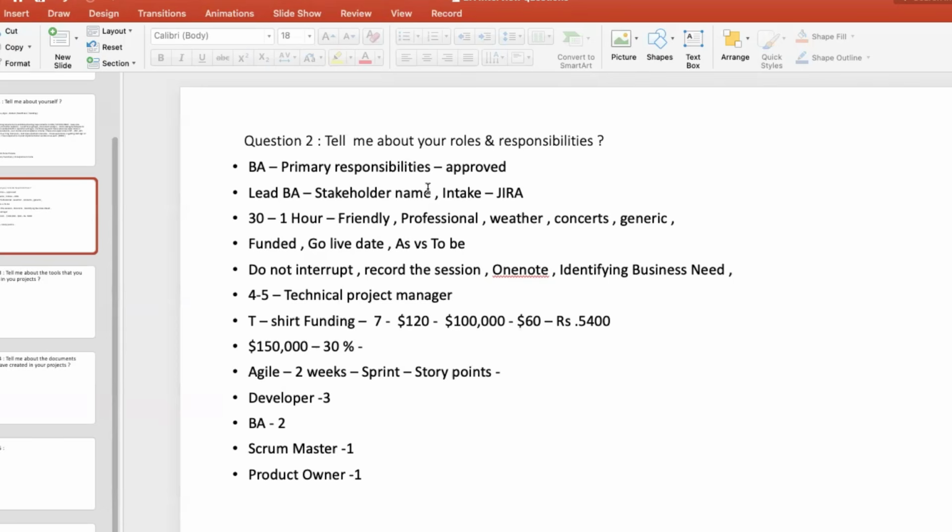Let's say you're getting only one name. You can ask that person how many people will be coming to calls, and whether they can give a list of names. By the very first or second call, you will know who's giving you proper requirements. But you can ask them, can you tell me who will do the UAT testing and provide sign off on behalf of the entire team? They'll give you a particular name. That person will be your primary stakeholder, because you cannot ask everyone to test.